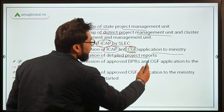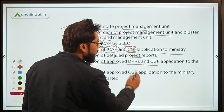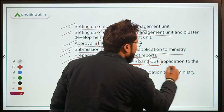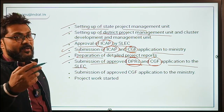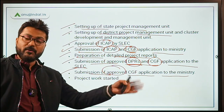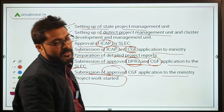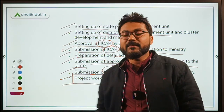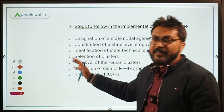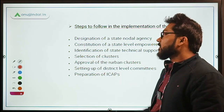After submission, detailed project reports (DPRs) are prepared. These approved DPRs and the critical gap funding application are submitted to the State Level Empowered Committee, which then submits the approved CGF application to the Ministry of Rural Development. Finally, project work begins.